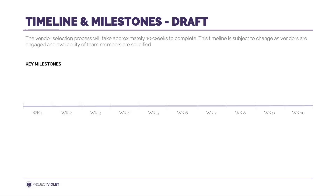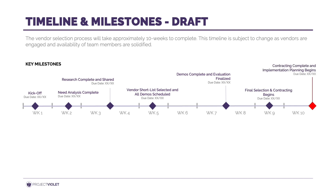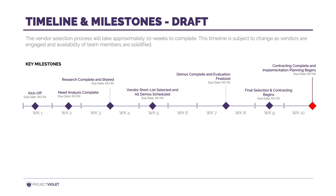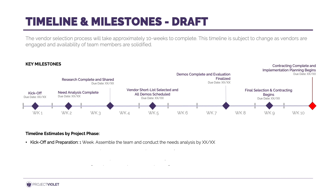This process is in your toolkit and depending on the size and scope of your project you can add or eliminate activities and deliverables based on what you need. To get started, let's talk through the setup items under preparation. Here is a sample timeline you can use that aligns with the vendor selection process. You can slide these milestone markers around based on what's appropriate for your team. Generally you can allocate one week to kick off the project and finish the prep activities, including the needs analysis.